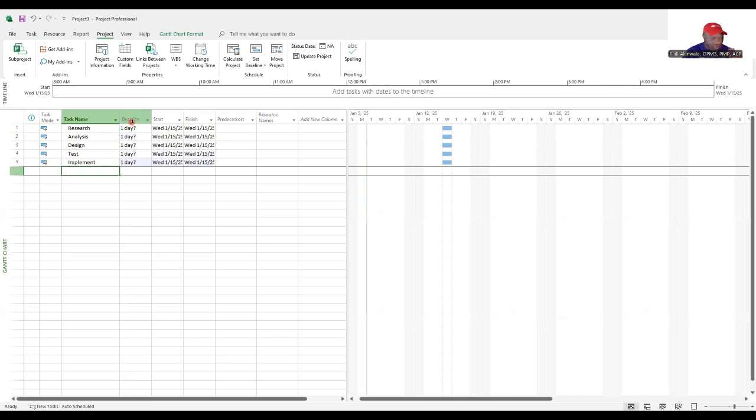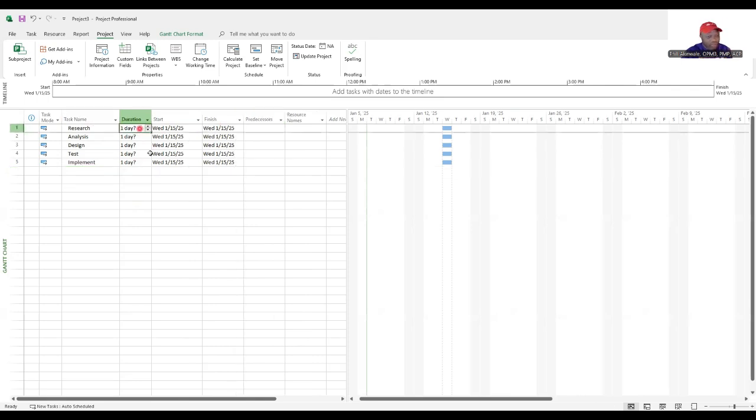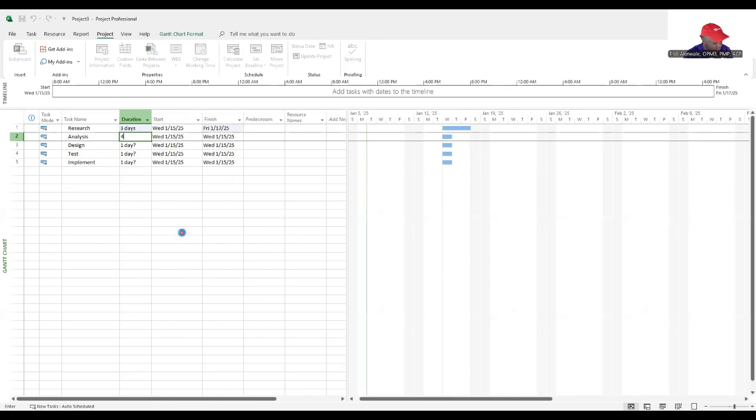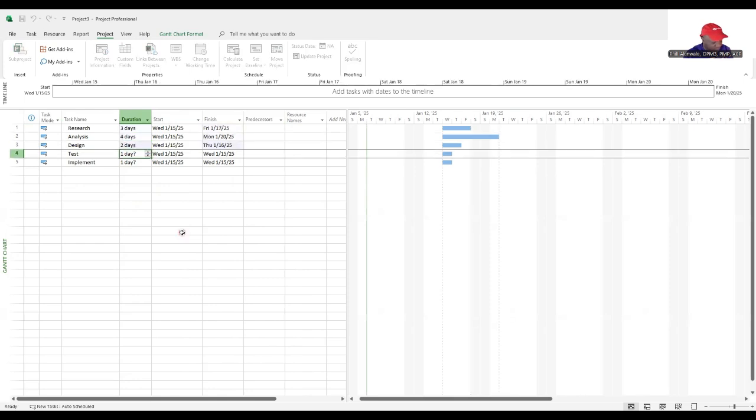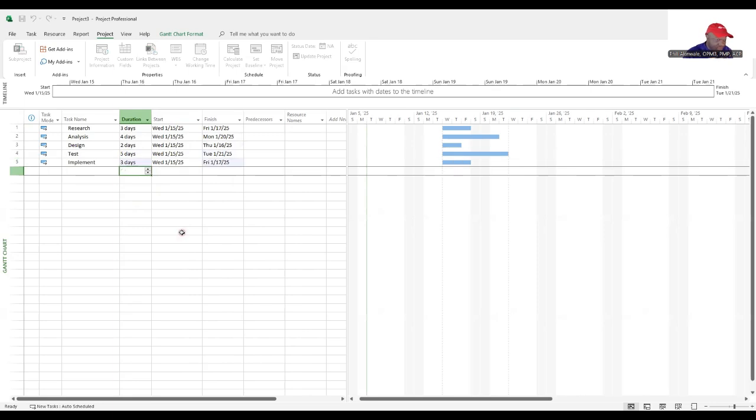You type your tasks in. Don't put in any start or finish dates. Focus more on the duration. We're going to put in some durations here. Arbitrary durations of three days, four days, two days, five days and three days.